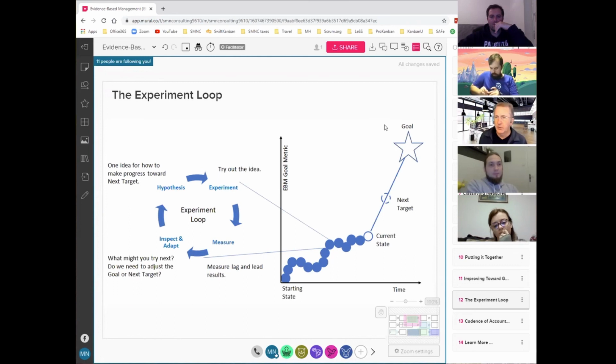One thing I failed to mention is that in addition to the evidence-based management review, or that kind of accountability, we don't consider it required, but most groups adopt an evidence dashboard where we have the goal and the goal measure, and we have the leading indicators underneath it with those leading measures.